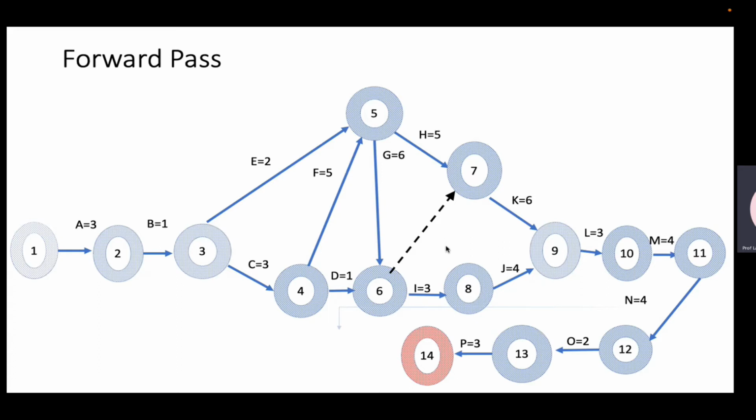So you can see that this is how you draw a network diagram. So you should give the dependencies. Now looking at L, you can make out that L is preceded by K and J because you can see it by the arrow. Okay, so this network diagram has to be drawn along with the activity and the duration of each activity. Wherever necessary, you have to draw a dummy node. Where it's not necessary, you need not draw. But this is the first step, and the most important step in project scheduling.